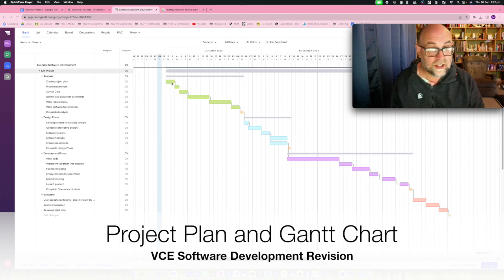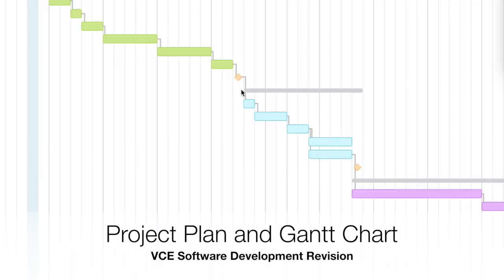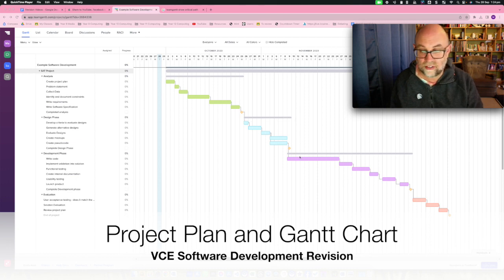That line is a dependency and it basically says this task can't be started until this one is done. Those are milestones, which means we are at a key point in the project — you don't actually do anything for those, but sometimes in a big project team you'll celebrate that. These bars here will tell you how long that section of the project takes.